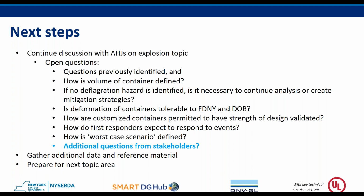Yeah, sure. So ESS systems at large are not exempt from the process considering 9540A. Of course, they are smaller systems and there is talk about a different pathway for them at some point. But again, all energy storage systems right now need to go through 9540A to get this data to influence the future of what permitting can be.